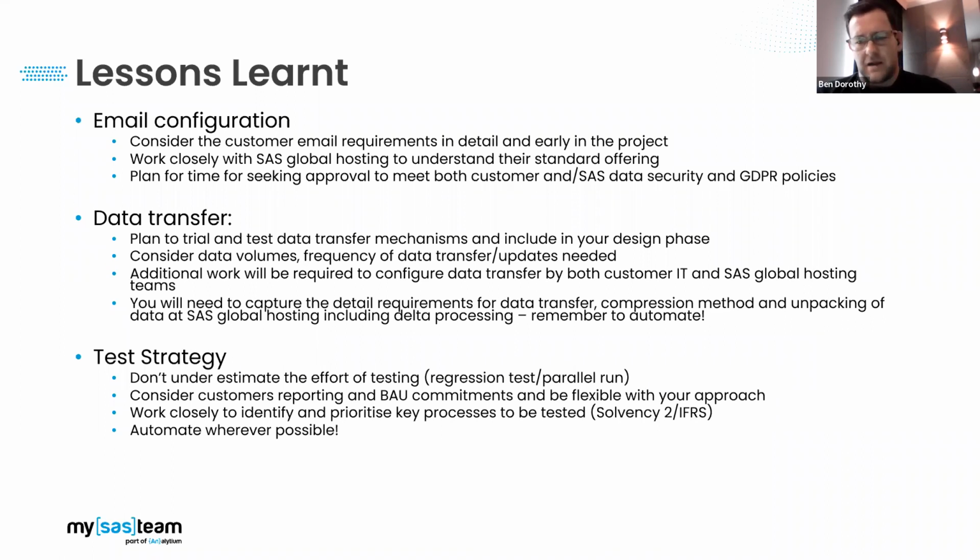Many companies would require at least a 2-month run of a change to any of these processes before acceptance.